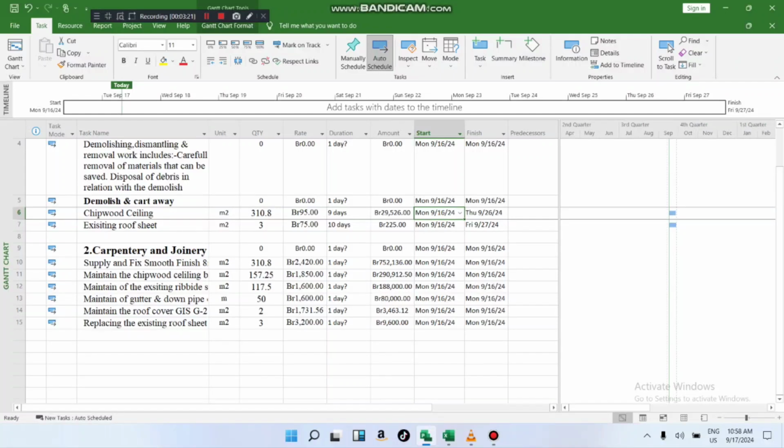From the day I started, I said I will start the work on Monday, and it will finish immediately. It will calculate the date for you because it's 9 days, so it will finish on September 26. So from 16 to 26. Okay, and this is 9 days.